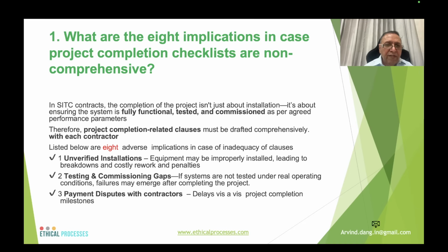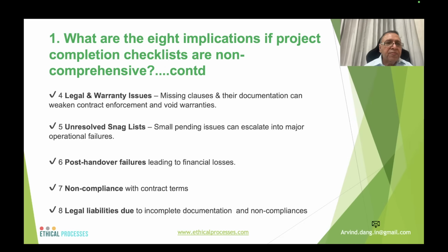1. Unverified installations. Equipment may be improperly installed, leading to breakdowns and costly rework and penalties. 2. Testing and commissioning gaps. If systems are not tested under real operating conditions, failures may emerge after completing the projects. 3. Payment dispute with the contractor. Delays versus project completion milestones.